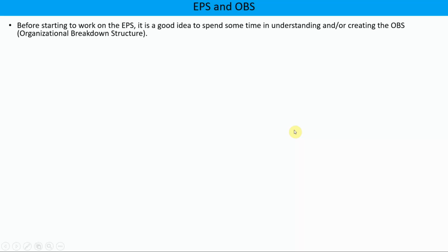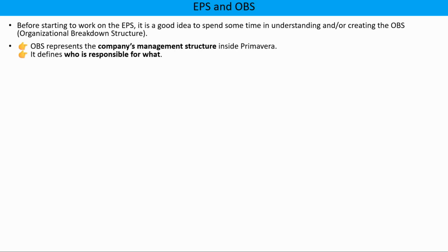So in this video, we are going to see OBS. So basically, OBS full form is Organization Breakdown Structure. Before starting work on EPS, it is a good idea to spend some time to understand or create OBS. So basically, OBS represents the company management structure inside Primavera.